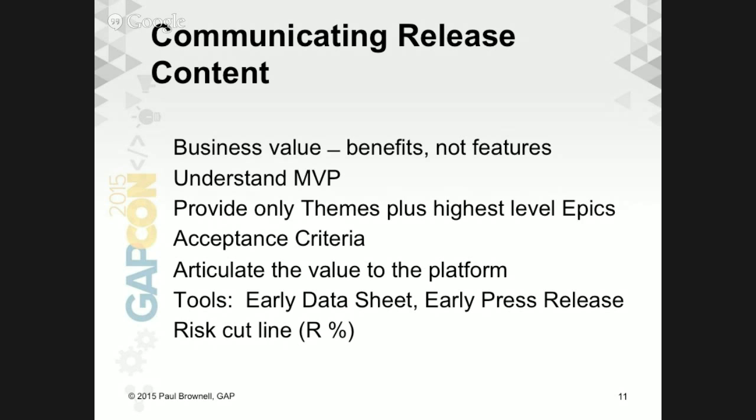You sure? Okay. All right, well, let me just tell you what you're saying to me. You're saying, Paul, I don't really care. You get to pick which one of these is priority 1. Because as a developer, I'm only going to be working on one thing at a time. So if you give me 4 things and they're all equal priority, that means I get to choose.